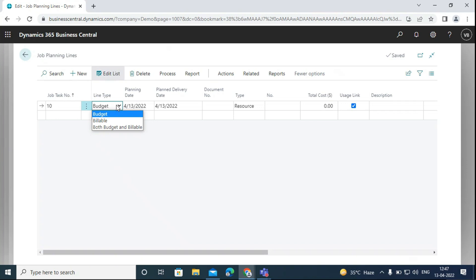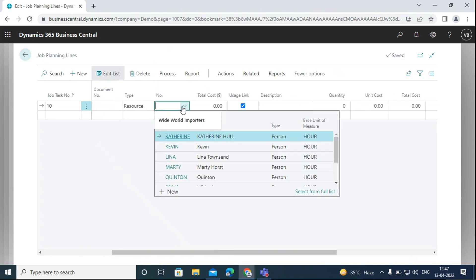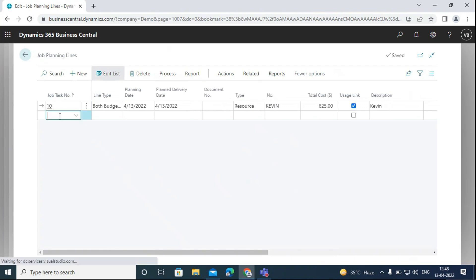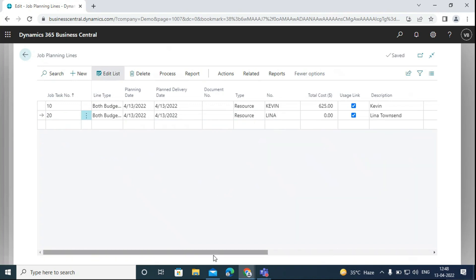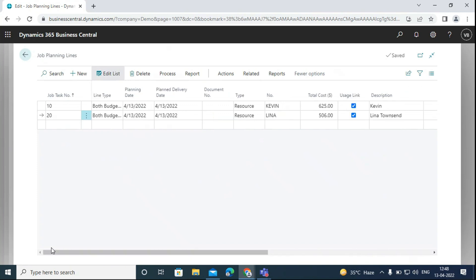Budget is for budgeting purposes — if we select budget, we can add it to the schedule but not invoice this line. If we select billable, we can only invoice and not add it to the schedule. We will select both budget and billable. The planning date will be 13th of April and we will select the resource Kevin, entering the quantity — the number of hours the resource has worked. For the second job task, we can select another resource, Lena Townsend, and enter the number of hours worked on the job. We will only create two planning lines for this job.